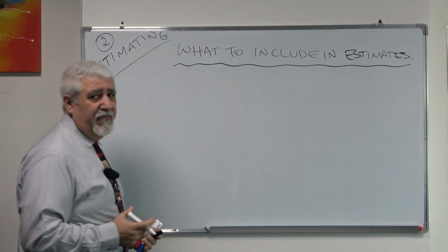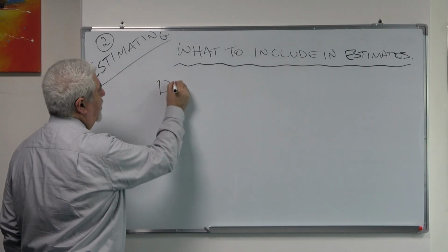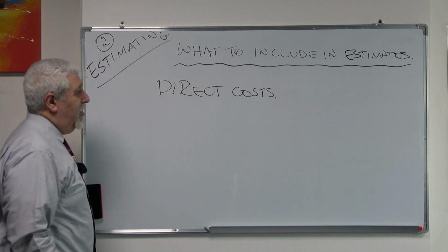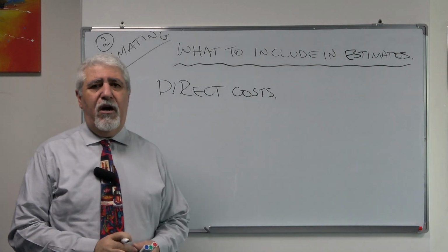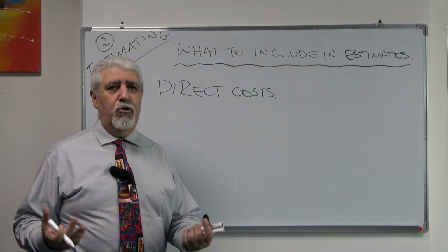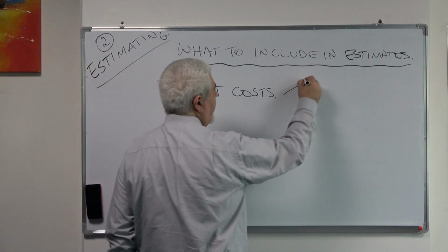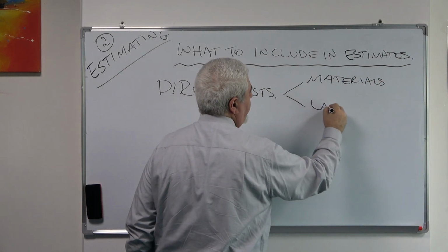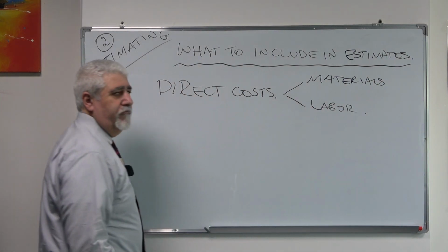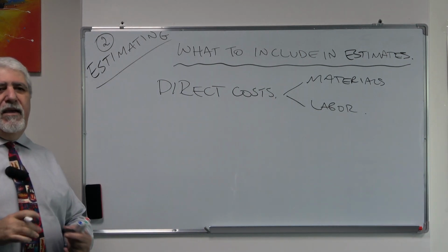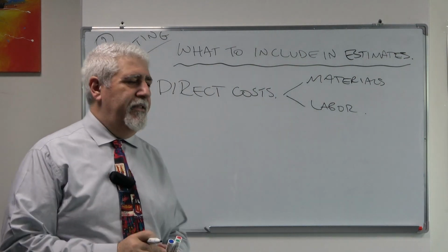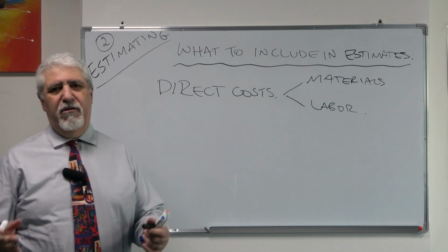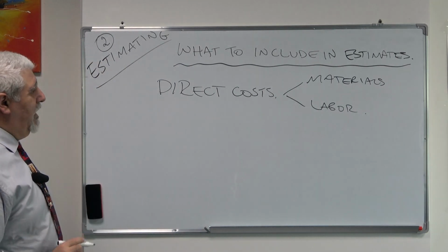And the terminology might be different from one organization to another, but typically we have what we call the direct cost. And these costs are usually the costs that would be permanent, the costs that will go into doing the work. So that will be material, labor cost, usually. And maybe if you are a construction project, the labor cost would include the direct day-to-day supervision, or maybe the foreman level, or maybe a bit higher, depending on the organization.